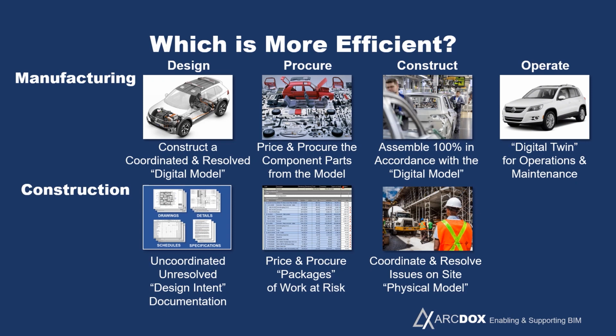So people are working really hard to catch up with the actual physical construction process and often making changes within that physical building environment, which is actually the most expensive and dangerous place to begin to make changes, because often people making changes don't realize how that change is going to impact others that are coming after them.